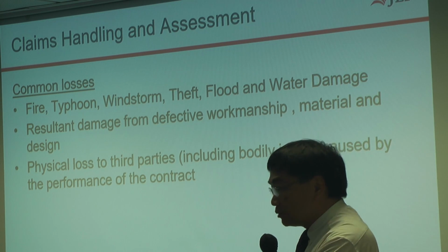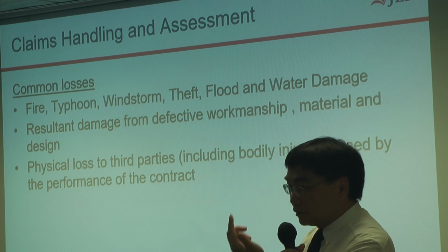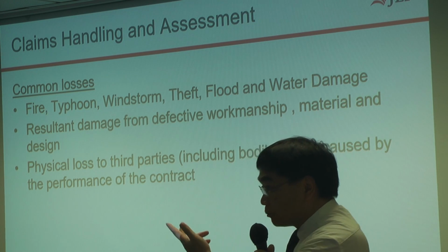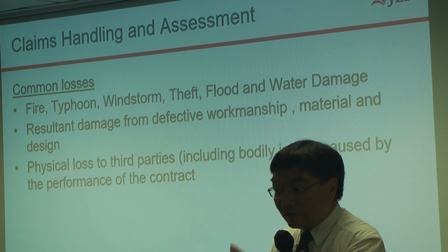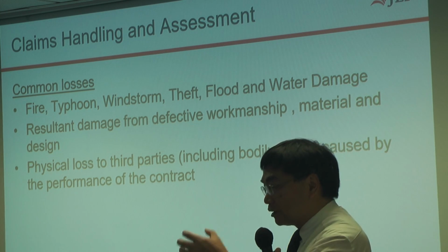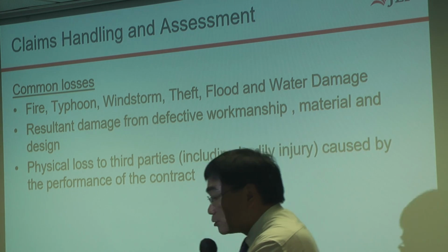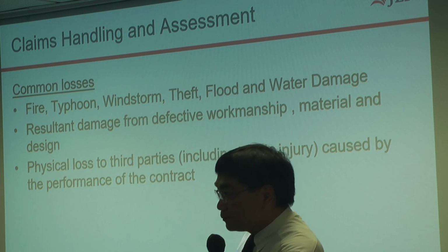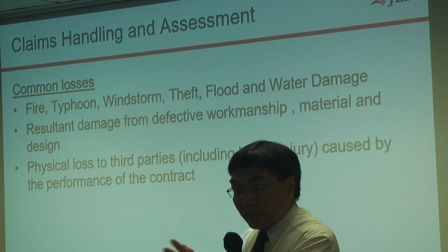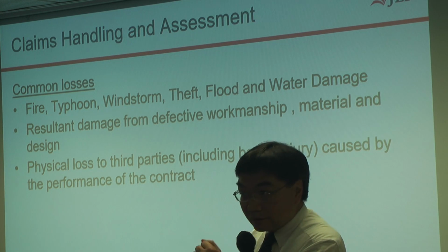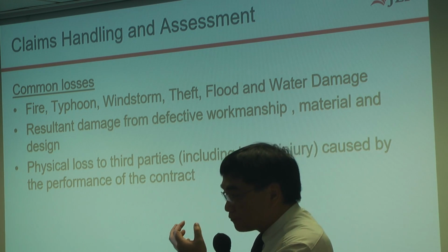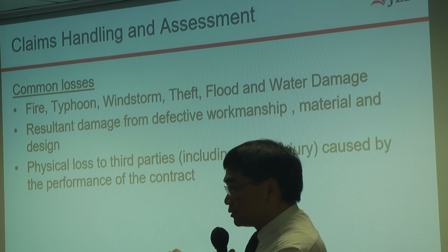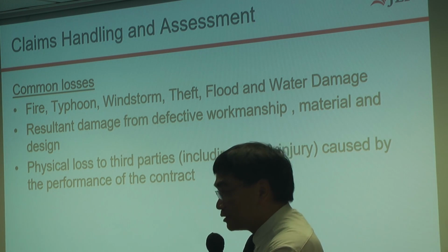So what's damaged? Lifts, building structure, fitting out works, fire service equipment. This was not pressurized at the time. Even though there's fire sprinkler and fire hydrant, they were not yet in operation, so they were damaged. There's a fire pump in the buildings while being constructed, but the fire pump was not in operation. So two buildings were seriously damaged.